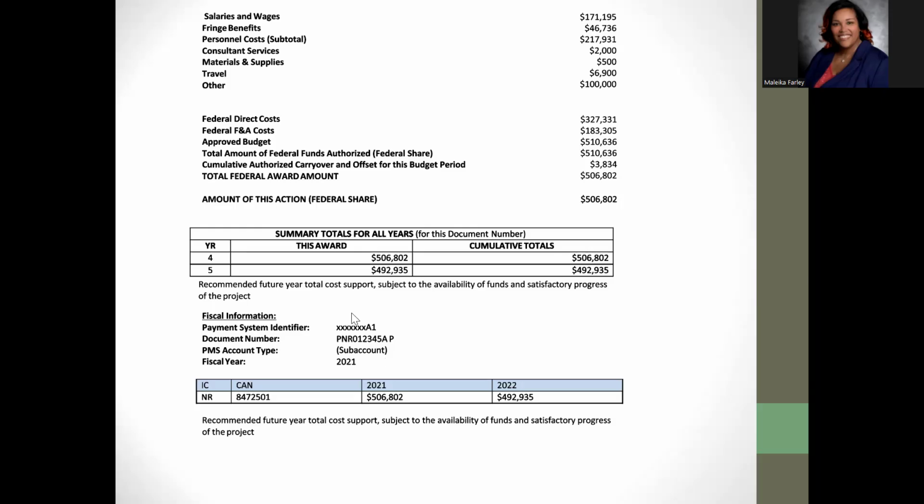And then here, can I just add? Yes. You can internally also break down your budget in addition to this, like add additional budget lines and cost categories, depending on what you want to see and track internally, but these are just the general cost categories that NIH uses. Depending on how your internal system is set up, you could have additional breakdowns of cost categories. And usually once we get a notice of award, one of the things we're doing is taking the original proposed budget for that period and updating it.